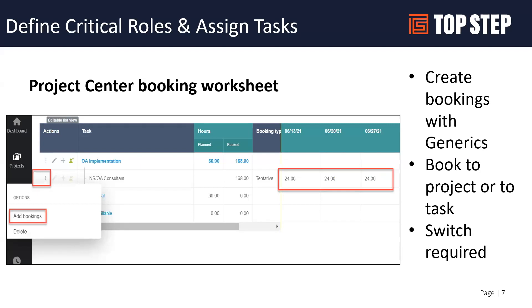Once you turn on the Project Center, there are a couple of switches needed to enable it in your account. One of them enables the project center booking worksheet. What this does is allow you to create your project structure and then go to the Project Center to request or set up bookings for your generic resources at the project level, or even down to the task level. You can see how many hours are planned versus how many hours are booked.